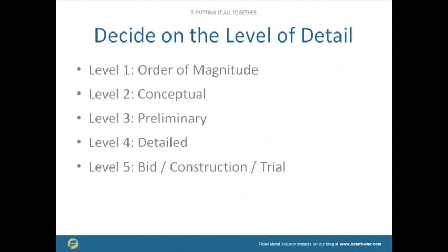You go, oh, wow, I was thinking more like spending $40,000. Okay, well, that's different. So that's the idea of doing an order of magnitude or conceptual estimate, and lots of time has been wasted by people doing detailed estimates when an order of magnitude or conceptual estimate would have sufficed to say, oh wow, that's a no-go. Don't spend any more time on that.